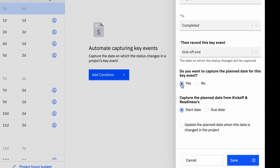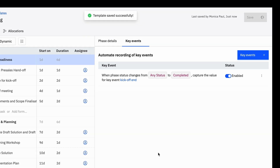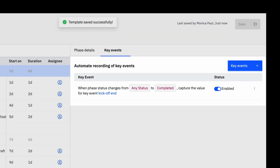Under Capture the Planned Date From Phase/Task, select Start Date if you wish to track the key event's completion. Check this box if you wish to override the planned date of the project manually. Click Save to set up the condition. Now, in a project that uses this template, when someone changes the status of the kickoff phase from any status to Completed, the actual date of the key event Kickoff End will be recorded.